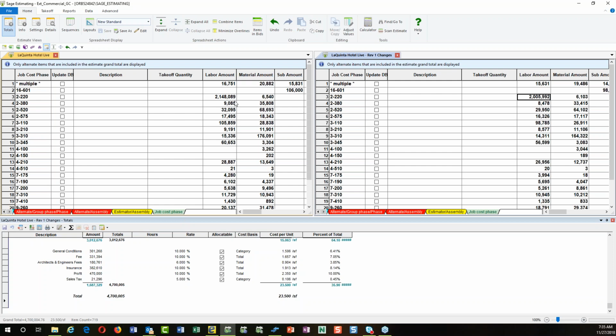How do we reconcile that? Well, that gets to be difficult and puts a strain on the relationship between you and your accounting department, because it's a real nightmare for them. Whereas here, you can give them this report and say, this is the original. Here is the number we went with where we made the changes, and here's the revision of those. So these will actually reconcile and support the number we submitted. So here is what you can give to your accounting department.